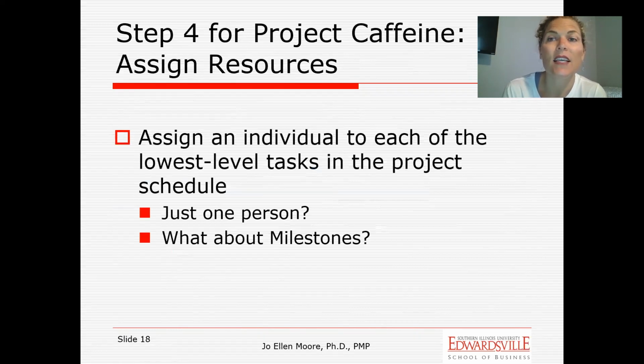And then the last thing that you're asked to do in the planning process is to start assigning the different tasks that you identified to particular people, to a specific person within your group. Ideally, you are identifying just one person per task, even though you might be working as a group on that task, and that's fine.